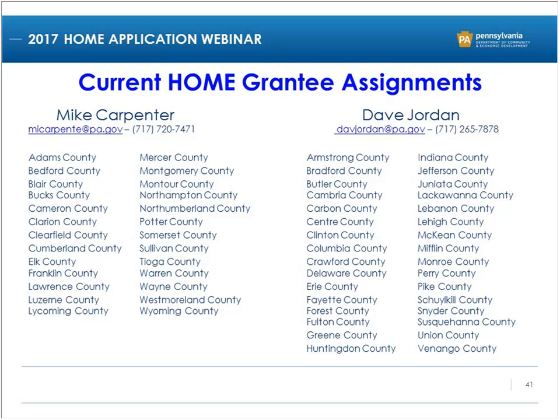Next question we have is, it is our understanding that you cannot accrue any expenses prior to environmental clearance. How do we do intakes prior to having the request for release of funds form and authority to use grant funds? So usually, this is John Cherry. I can partially answer that question, I guess, is that you should begin to have an understanding of the properties that are on your list to do rehabilitation for. So if you have a potential list of rehab properties, you can start to do your Tier 2 for those properties if you know you're going to get 2 of them.